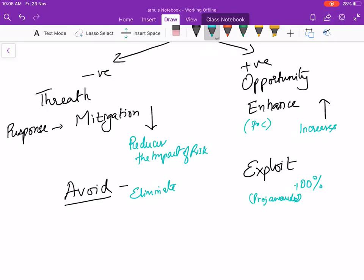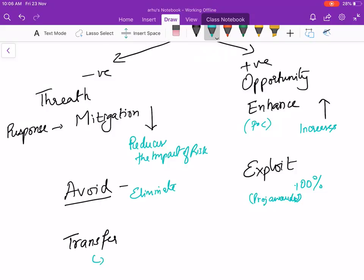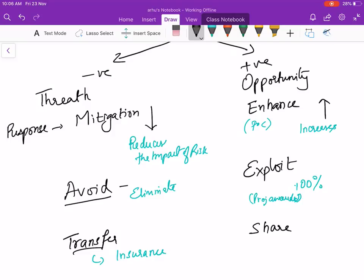Sometimes you will say okay, it's not a big deal, let me share 50% of the responsibility on the risk. So you will transfer the risk, means you will give it to somebody else. It will be like an insurance in which the responsibility lies with the other party, so they take the overhead of the risk transfer.